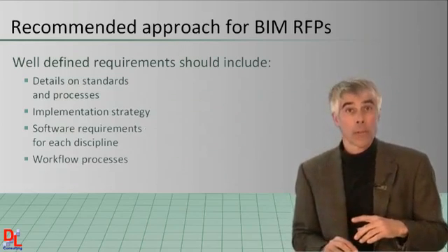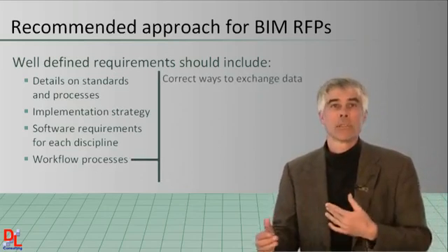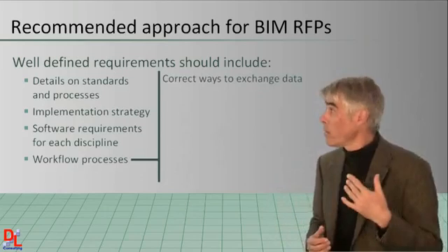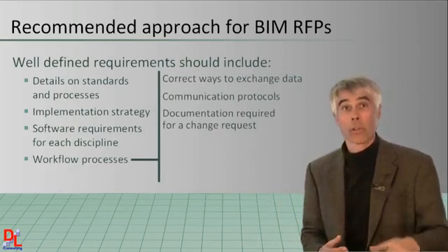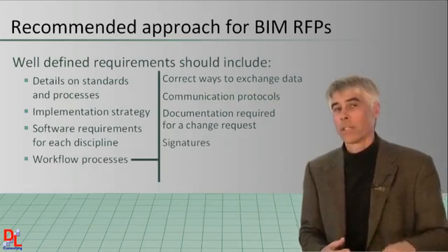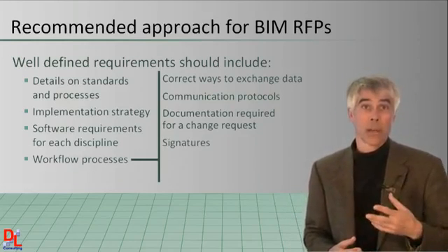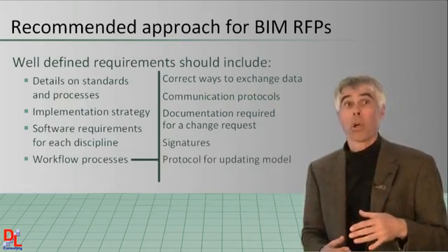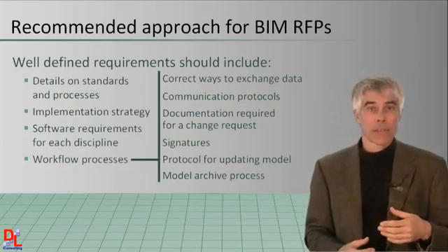Also, it should cover workflow processes. For example, what are the correct steps to exchange model data? What are the communication protocols? What documentation is required for a change request? Who needs to sign off on those change requests or on updates or changes in the plan? What will the protocol be for updating the model? How will the model's content be archived?